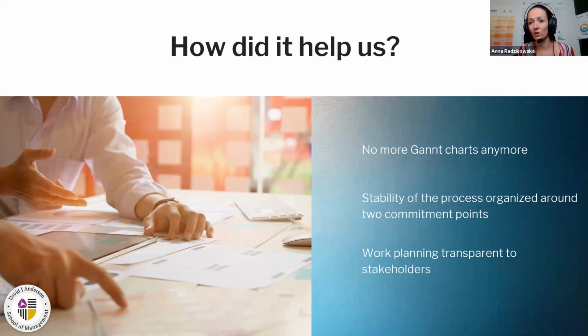So when we started working on the new report, it was in the upstream system when we defined the requirements, when we discussed with the business what they really want and what they actually really need. Then we had the process of replenishment of our delivery queue. So they knew what the next work we were going to start would be. Then we did the delivery process. And then when we did the testing, which they were also involved in, we could all together decide on the delivery date.